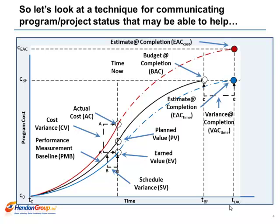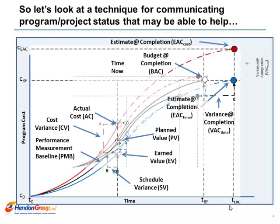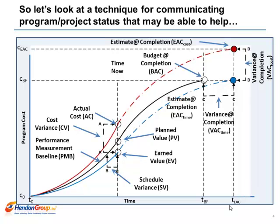Again, remember budget at completion for cost will change throughout the change control process, so remember to keep budget at completion updated with approved changes and scope additions or subtractions. The variance at completion for cost is simply the difference in cost between the budget at completion for cost and the estimate at completion for cost.